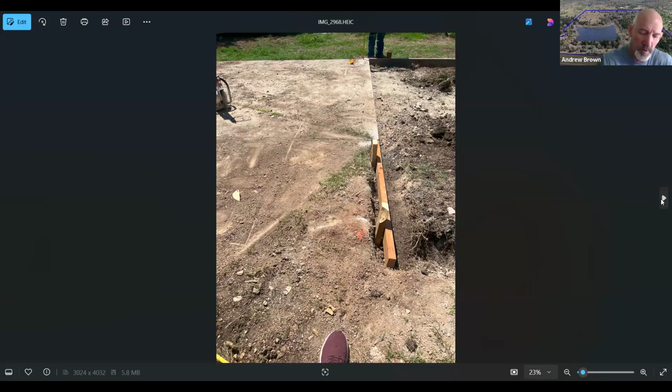When an architect's stamp dies with them, a new architect doesn't necessarily want to take over someone else's plans because they almost feel like they have to start from scratch. We're hiring an architect right now, and he is a one-man shop. I told him, I like you, I think you see the vision I need for what we're trying to build. Here's my concern. And he said, that's perfectly understandable. He brought in a firm that he used to work for to be backup for him. So our contract says he's our architect, but should something happen to him, they will take over his contract.